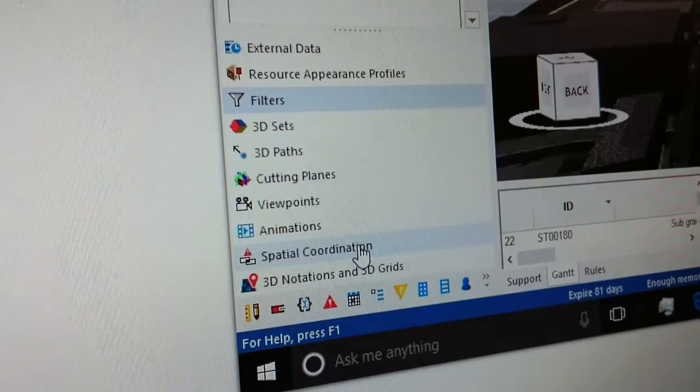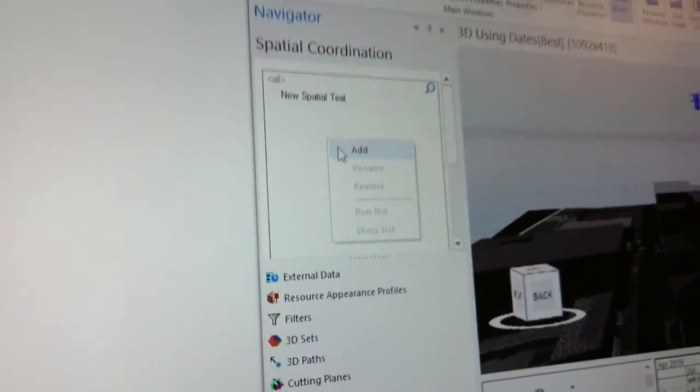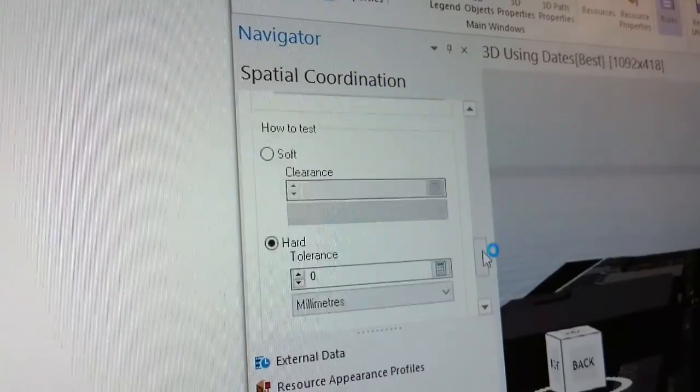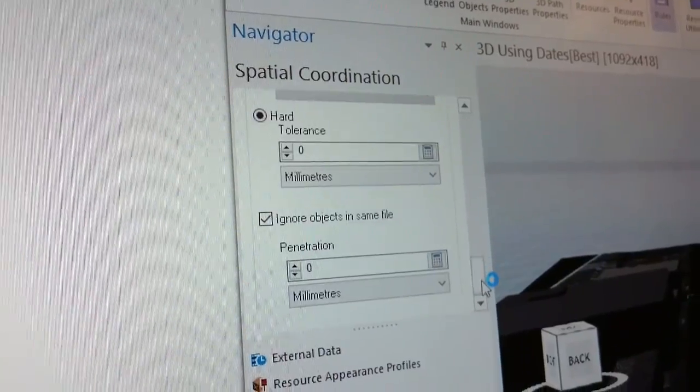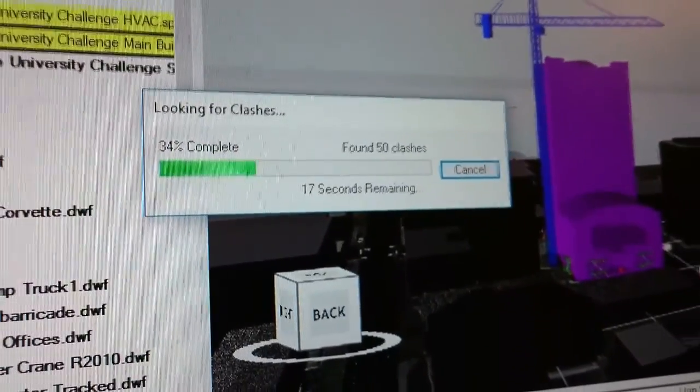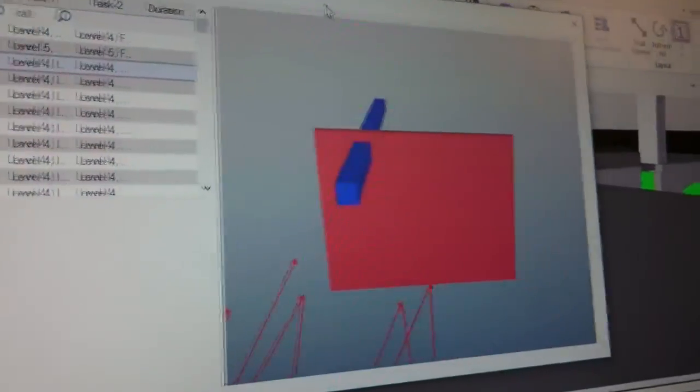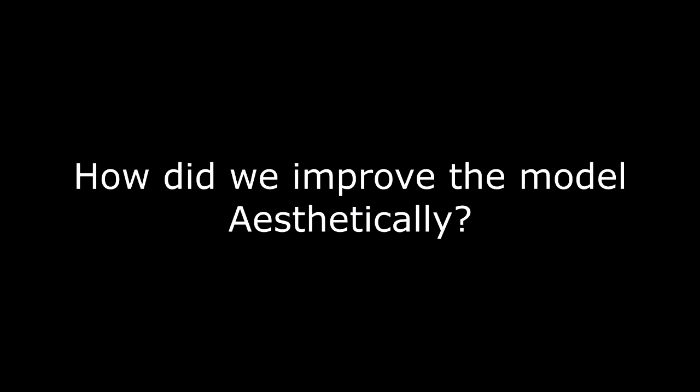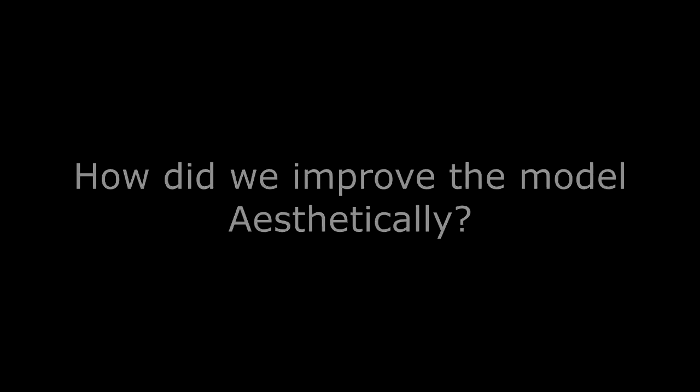As we had two different models to work with — one architectural and the other HVAC for this building — we thought of detecting clashes, if any, between the two models. Using the clash detection function of Synchro, we were able to find clashes between the architectural and HVAC elements, and this puts us in a better position to rectify many of our errors.